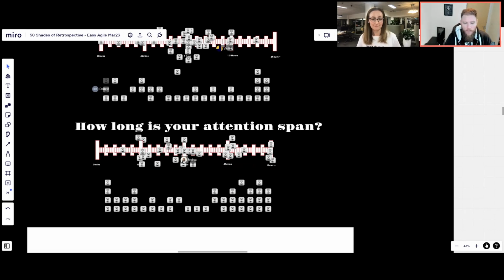Tell me, what typically happens at the end of a retrospective? We capture actions, or most people capture actions. And the problem is if we're saving the capturing of actions to the end of the retrospective, at a time when our minds are already thinking about what's for lunch, what's my next meeting, our attention spans are gone, then we're going to cause ourselves some problems. So the thing I emphasize is, and this might be something to experiment with, a little less conversation, a little more action.